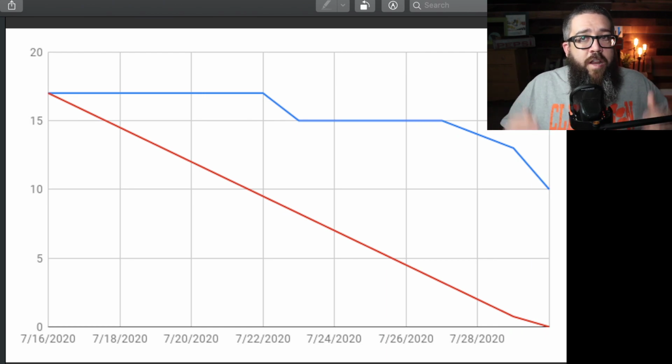If you're not burning down, then the question you should be asking yourself, if you're on the team, Scrum Master, you should be asking your team, why is our cycle time so long? 9 times out of 10, your cycle time is too long because your WIP is too high.